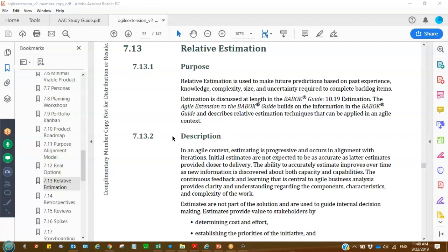And what they did was they said, take the critical path and cut the critical path in half in terms of the amount of time and effort that you're going to put forth, and start from that as a premise and see where you go, and then add additional resources on as you need them, but not try and put this whole path together and go from start to finish. Sort of kind of an agile thing to do.